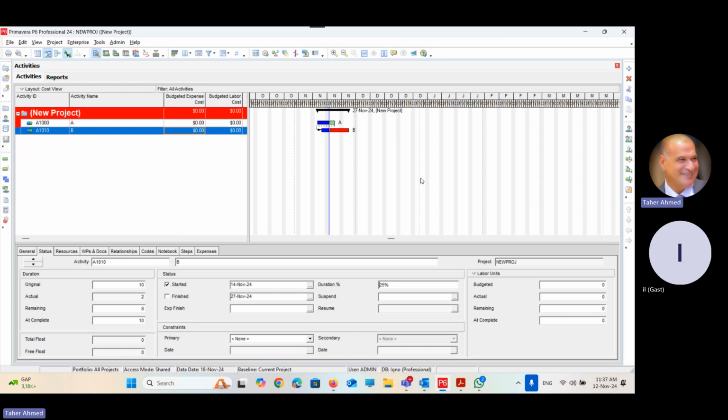But usually owners and the consultants like return logic. We agree about the logic, so we have respected the logic. Contractors usually like progress override. If I was capable of doing some activities earlier, it is my right to calculate the progress based on the progress, not the logic. Which one is correct? Which one is wrong? Both of them are correct. Both of them are wrong. The point is we have to agree.